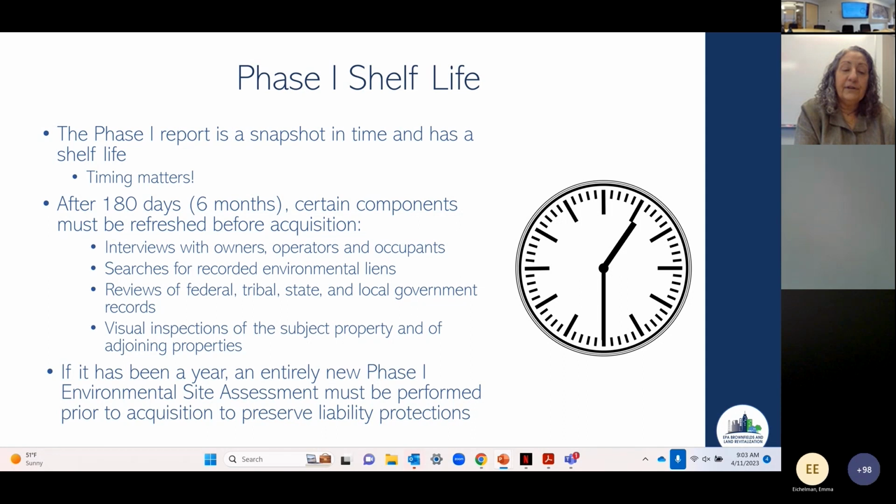So whether that was the site visit or the date of the database pull, the key elements that are time sensitive are the environmental consultant going out and doing surveillance and a site visit and inspection, and the date the environmental records database report was obtained. That's the date that begins the 6-month clock, not the date of the report. This is a little factor that is often overlooked.